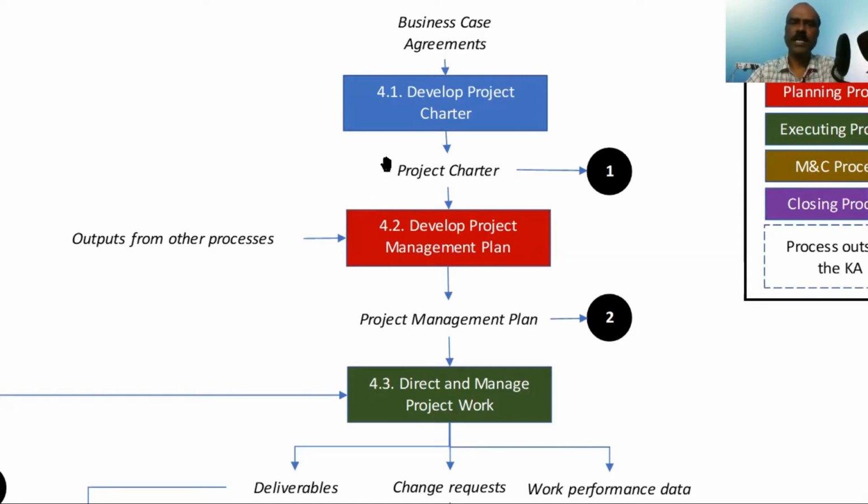So what is project charter? As I told you, it is a 1-page simple document that captures the high-level information to kickstart a project. So project charter doesn't contain very much details. It's just a kickstart, a high-level information. If I want to construct a house, it will just say the project objective is to construct a, say, 4-bedroom house in ECR, Chennai. That's all. We don't go into the details of the house. That will be done in scope management. Right now, it's only high-level instruction.